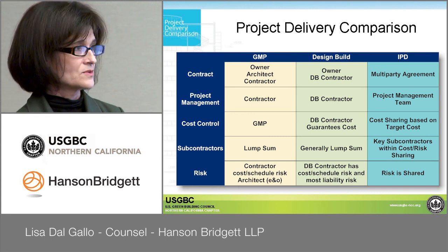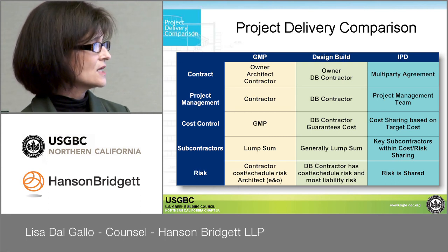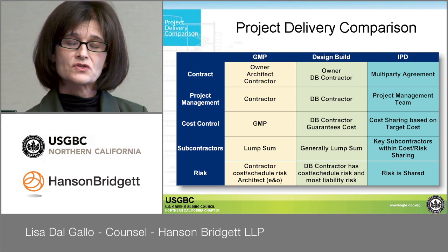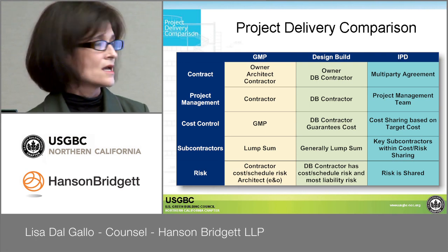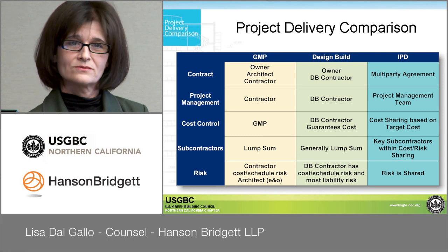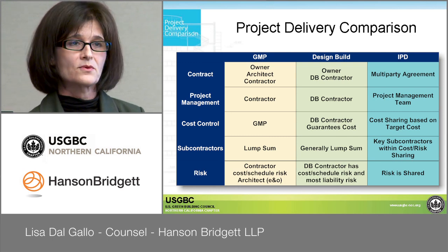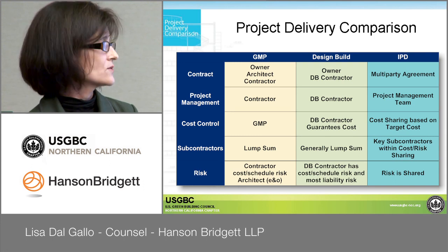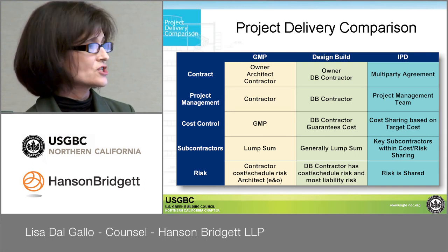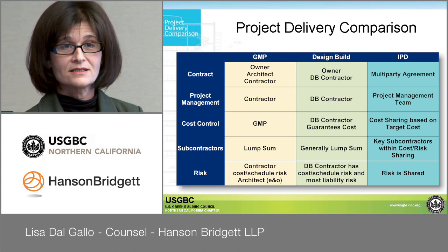If you look down at the bottom, you'll see that the risk is shared. And that's because there's a waiver of certain claims, a lot of claims, and we'll go over that a little bit later as to which ones are held back. But there's waiver of the majority of the claims, so people are free to collaborate early on. The risk is shared. The cost is shared.